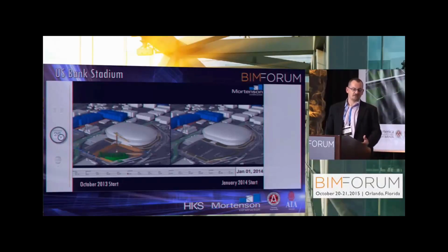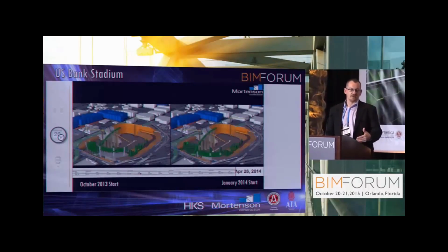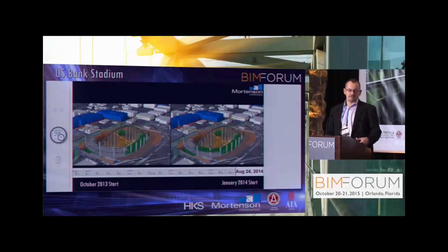So the customer's idea was, let's start the construction in October 2013. Let's cut all those last season activities, those Monster Truck Madness shows and all that stuff, and start construction as soon as possible. But we analyzed the schedule, we analyzed the site, and said, you know what, Mr. Customer, maybe that's not necessary. Maybe you can start construction a little bit later, because our ultimate point of conflict is the demolition of the existing stadium.